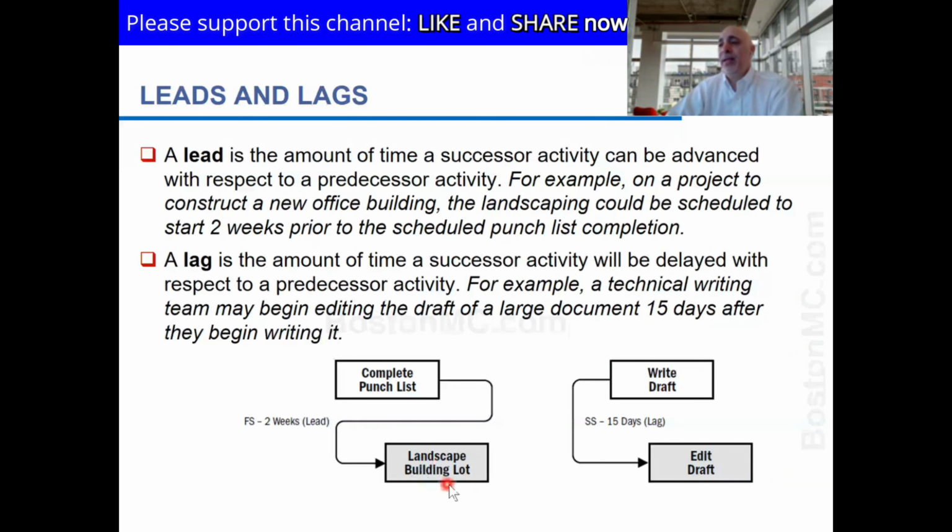All right. I explained leads and lags. So leads allows you to start something before, and a lag says you have to wait for a specific period of time. Another place to use lag, by the way, is when you order supplies or order anything and you know it's going to take 2 weeks. So you can say, once I finish ordering, it will be a lag of 2 weeks or 10 days, let's say, or 14 days before the product will come. So this way your schedule is more realistic. From order to receiving, you put a 14-day lag.